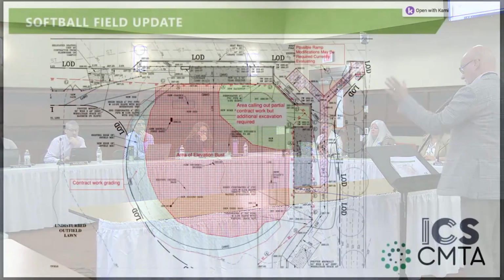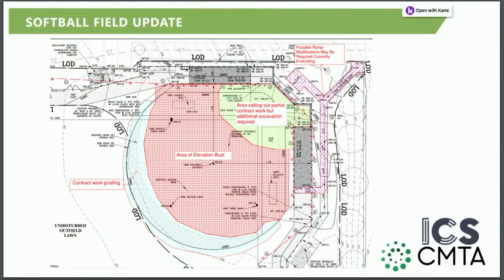I wanted to give you an update on the softball field. As I'm sure everybody's aware, there hasn't been a lot of progress out there, and we've run into some challenges with the site. This first slide depicts the area of the softball field, and due to a bust in the elevation, which means we used existing as-built drawings as our benchmark to design the field, those drawings were incorrect.